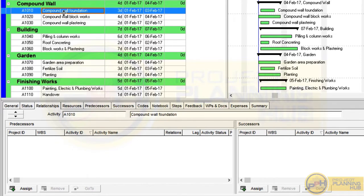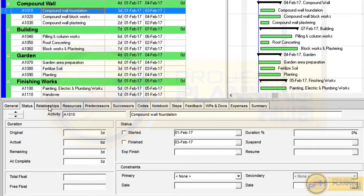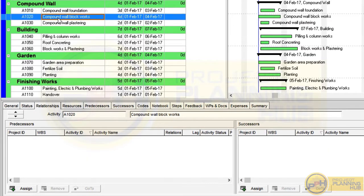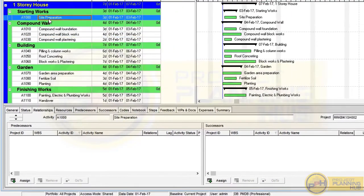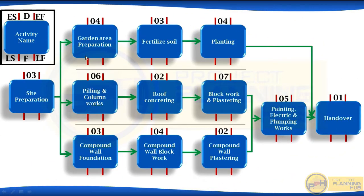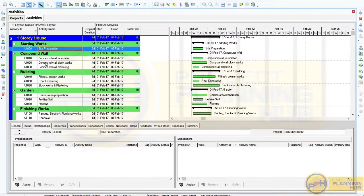To add a relationship, first select the activity, then add its predecessors or successors in the lower half. For example, select an activity and see its general, status, and relationship properties in the bottom part. Now let's start activity linking. Select the Relationship tab, then select our first activity: Site Preparation. Looking at our activity relationship chart, after Site Preparation we need to start three activities: Garden Area Preparation, Piling and Column Works, and Compound Wall Foundation.